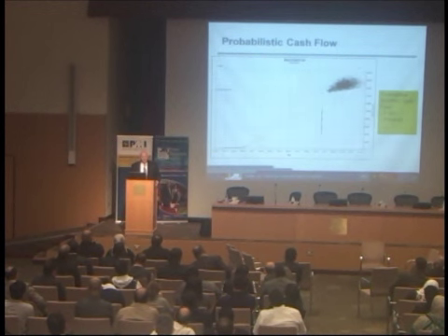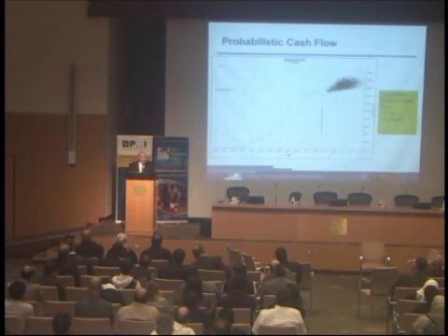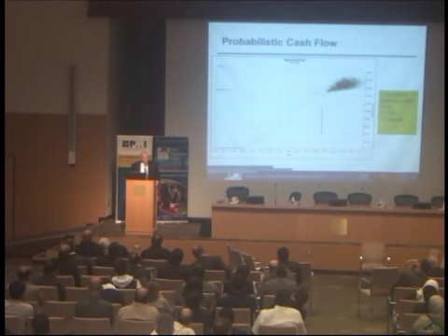The project manager immediately took his team to an offsite, and they reprogrammed the thing so that risk adjusted they would meet their budgets. They'd been given budgets by the Department of Energy. They were going to meet those budgets. They hadn't realized that creating a plan for meeting the budgets was not enough. You had to create a plan where risk adjusted it would meet the budget.